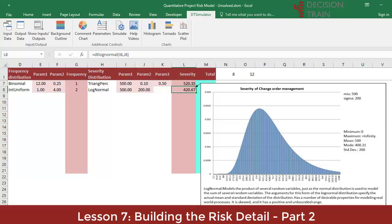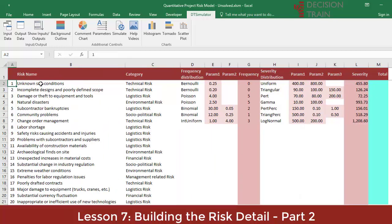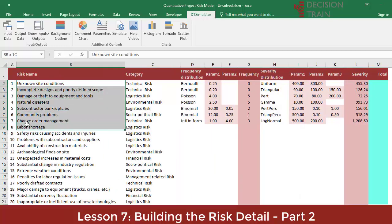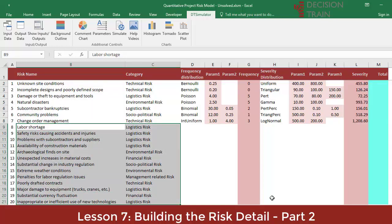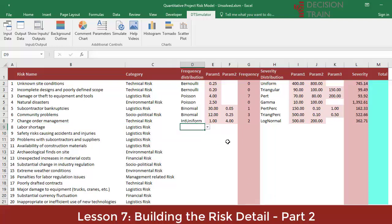We have now completed the quantitative specification of seven risks. In the next lesson, we will see how, with the complete model, the Monte Carlo simulation is generated and how the graphs are interpreted. At this point, if you want to practice, you can continue filling in the remaining 13 risks. The other option is to upload the completed workbook containing the first seven risks plus the additional 13 risks. Either way, the full risk log will look like this.